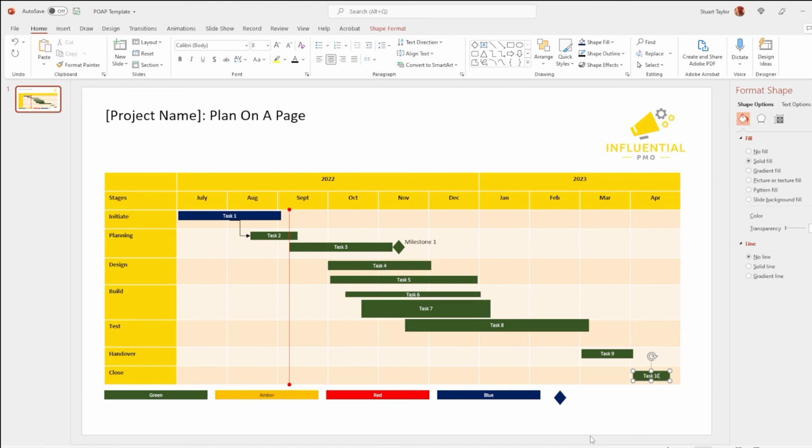You may find that you need to group a number of individual tasks from your detailed plan to create a single task, as the audience is unlikely to be interested in all the small tasks needed to deliver a useful output. For example, your detailed project plan may list the many steps in creating a training guide. Things like identifying procedures, writing them into the guide, getting the guide reviewed, getting the guide published, when your audience is probably just going to be happy to see a single task saying create and publish user guides and seeing when it starts and when it ends.